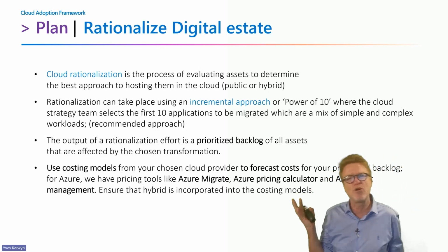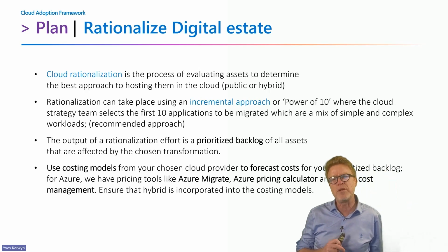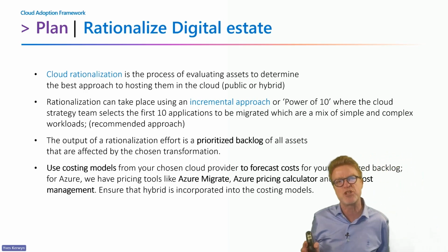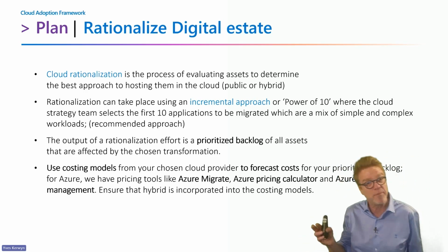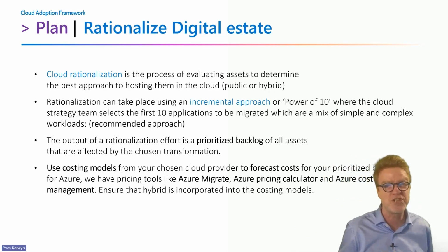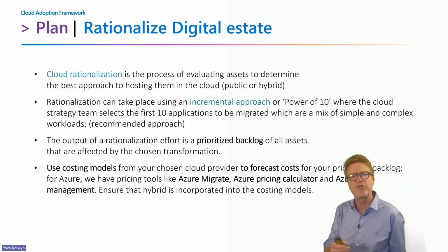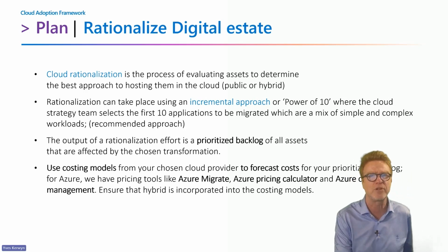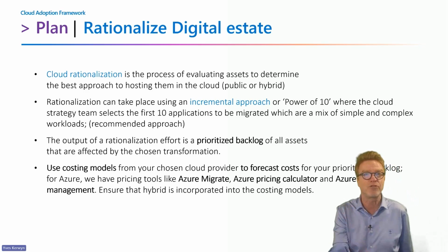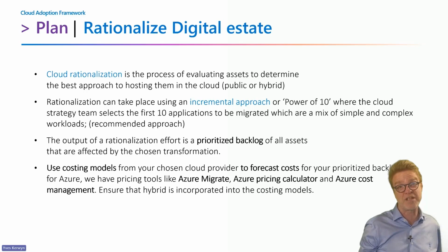The incremental approach is very related to large IT estates, where you probably will want to identify 10 applications, which is typically already a lot. Remember the first project: identify the first workloads, the 10 workloads, applications, migrate them, spend a lot of time with that, and then you have the power of 10. Once you have done that, it will be scalable to start to scale and leverage what you learned during that phase for probably the other 100 workloads. And that's what they try to say.